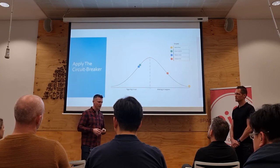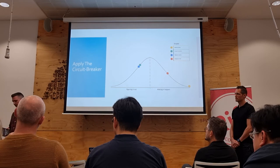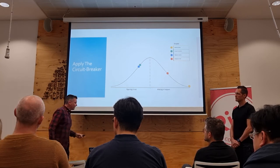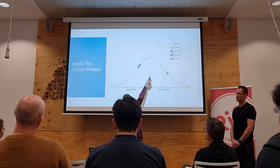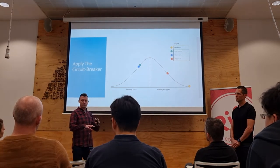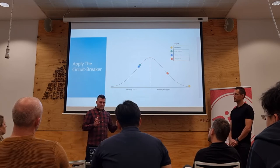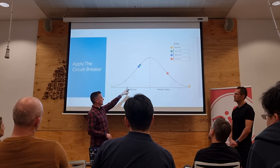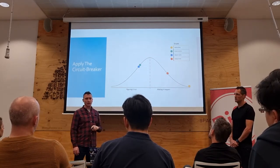This happened in our first cycle. So, if everything at this point is at the top of the hill or over the hill, you can go, yeah, you figured it out. We can more accurately predict how much time is required. Have a couple more days, that's fine. Good, thanks. This stuff's on the left side. They're still figuring out. They have no idea how long this stuff has to go.